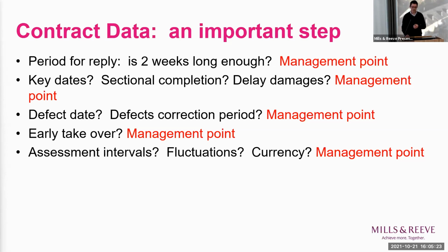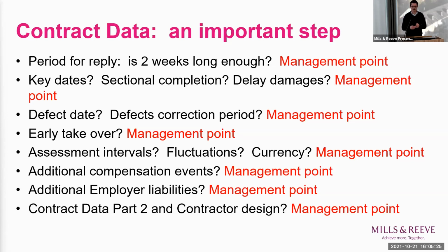The other issue to be aware of, there are a couple of traps around compensation events and additional employer liabilities, which Lena will deal with. And there's a little quirk hiding away in contract data part 2, which is a requirement that to the extent that the contractor is designing an element of the works, that has to be completed. Otherwise, it is a traditional form of contract rather than a contract which has a design element.